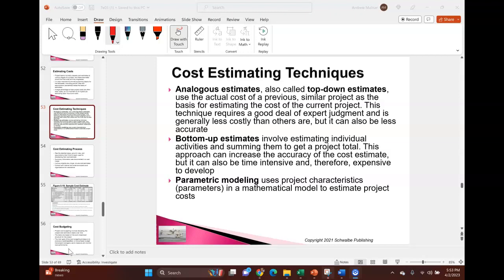This is it. Some important points, though, in these final slides. There are ways to estimate. You'll use which best for you. A high-level estimate is called analogous estimating. And the root word there is analog, or analogy. So by analogy, I would look for some historical records of a similar project of equal scope to mine, and I would maybe make some updates, but it's by analogy. It's analogous using historical documents.